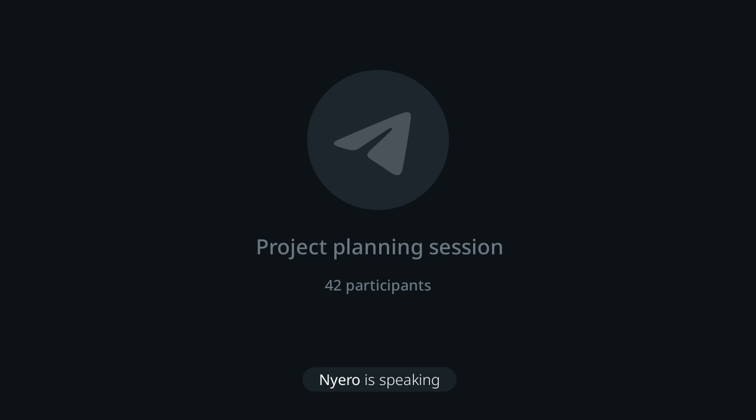How long will it take you? You tell me. Everybody will talk their own. The PM will document it. Now, what happens is everything that you said you want to do during this sprint, that's what you would do. So it doesn't mean that it's one feature per sprint. It is essentially your team telling you that in these 2 weeks, this is the amount of work that we will be able to cover within this 2 week duration. That is essentially what happens.